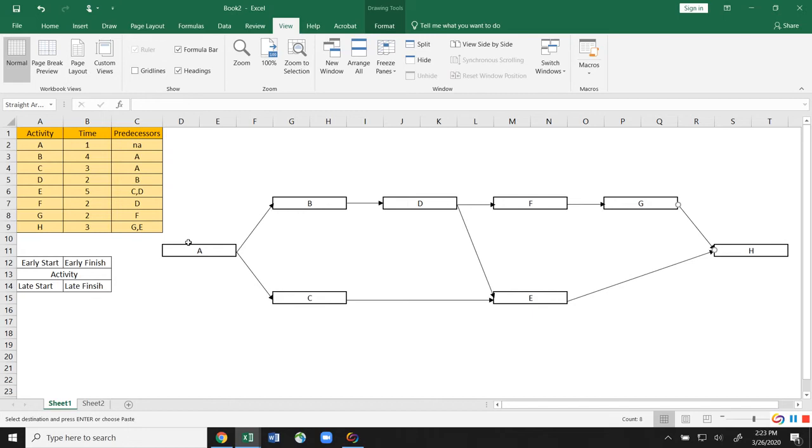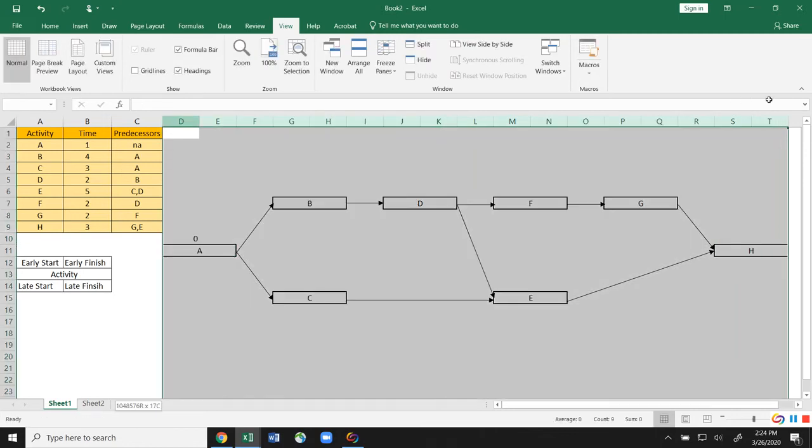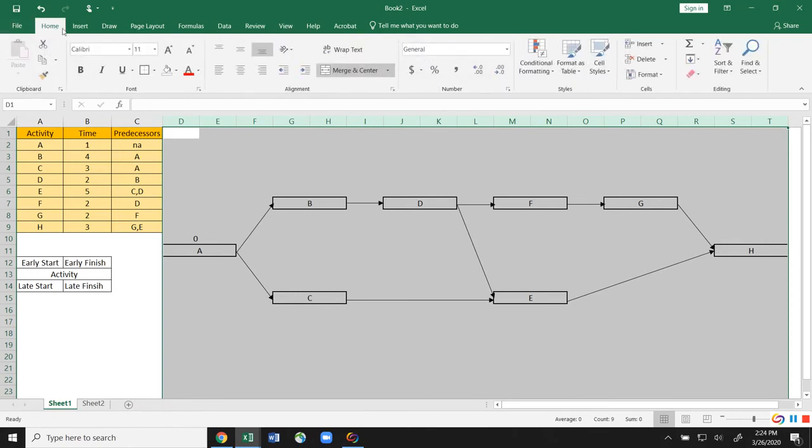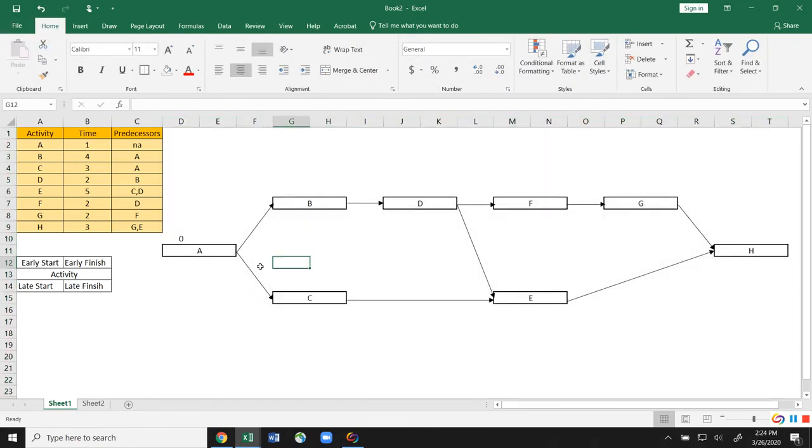So we'll start here. The earliest start is what we're thinking about to begin with when we're going across the top. And the way you want to do this, you want to do all the top numbers first and then move to the bottom and do the bottom numbers. So the earliest we can start our activity is time period 0. I'm going to make this all center aligned. So it's on. Okay, there we go. All right, so that's activity A. The earliest we can start is 0.